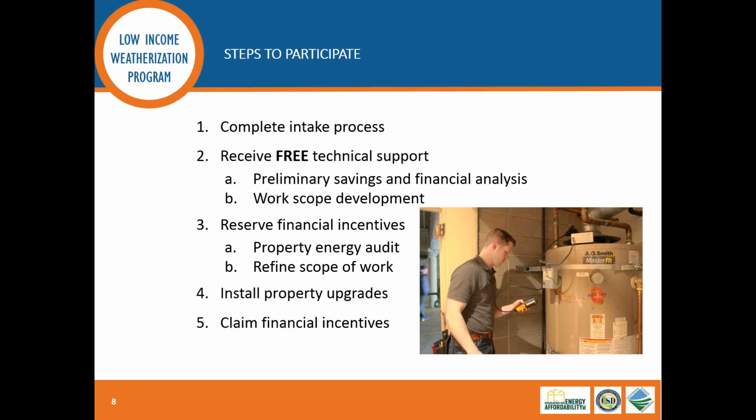And Nick, you mentioned making sure of what the maximum incentive is. We have a question on that: is there a maximum incentive that a project can receive? Essentially, the maximum incentive is the LIWIP rebate plus any other additional rebates the property is getting if they're leveraging other EUC or other programs. We just need to make sure that the sum of all the rebates isn't greater than the actual project cost.